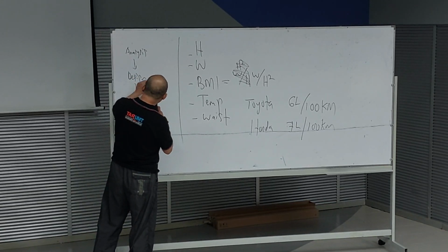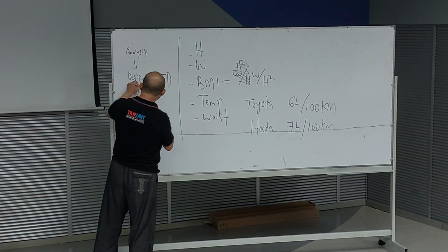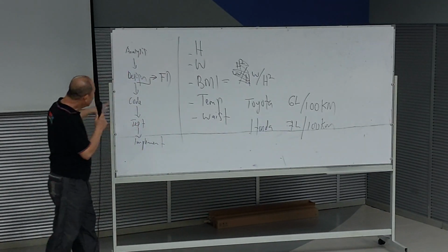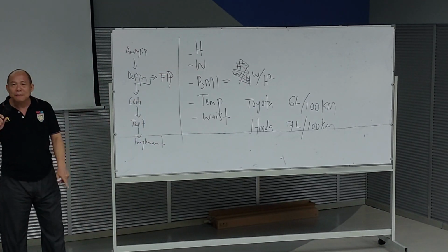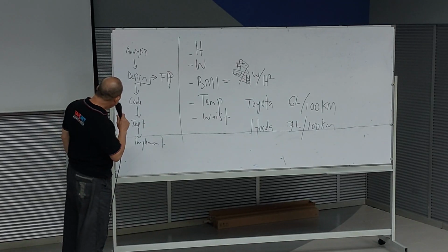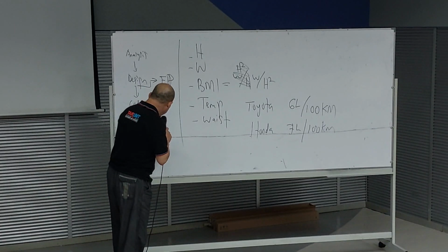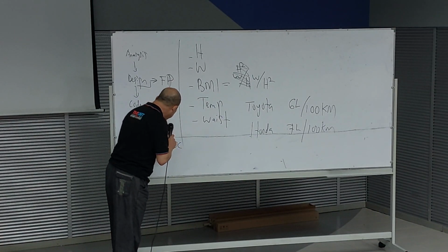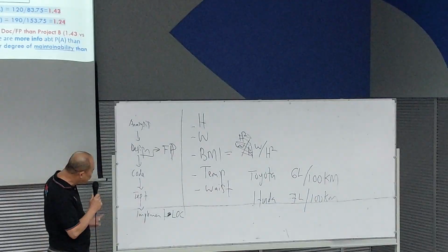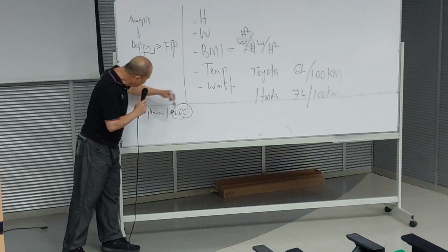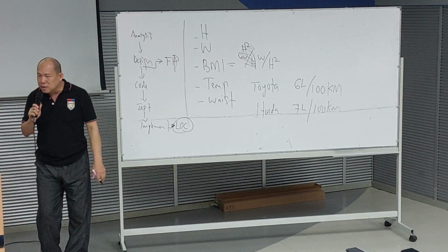You should be able to determine the function point at this stage. After design is completed, you should be able to determine the function point. So lines of code, total lines of code, after implementation. Okay, so this means